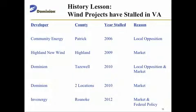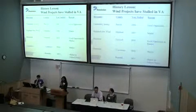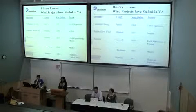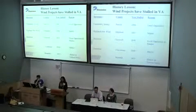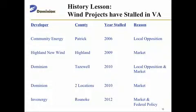So this is our interpretation of what has happened in the past to some of the projects that have made things stall in Virginia. Back in 2006, there was a community energy project in Patrick County. There was a lot of local opposition to that project, and it stalled in 2006. One in 2009, Highland New Wind. It's in Highland County. They went through all the permitting. They had their SEC, CPCN, and it stalled. But look at the time frame. It was 2009, and as I showed earlier, that's exactly when the prices of gas made it so that wind projects weren't as economical.